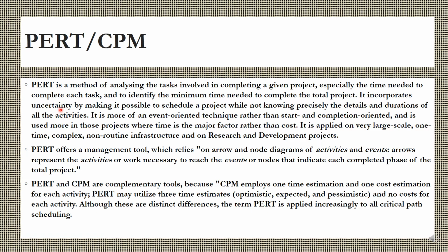It incorporates uncertainty by making it possible to schedule a project while not knowing precisely the details and durations of all the activities. It is more of an event-oriented technique rather than start- and completion-oriented, and is used more in projects where time is the major factor rather than the cost. So it is applied on very large-scale, one-time, complex, non-routine infrastructure and research and development projects.